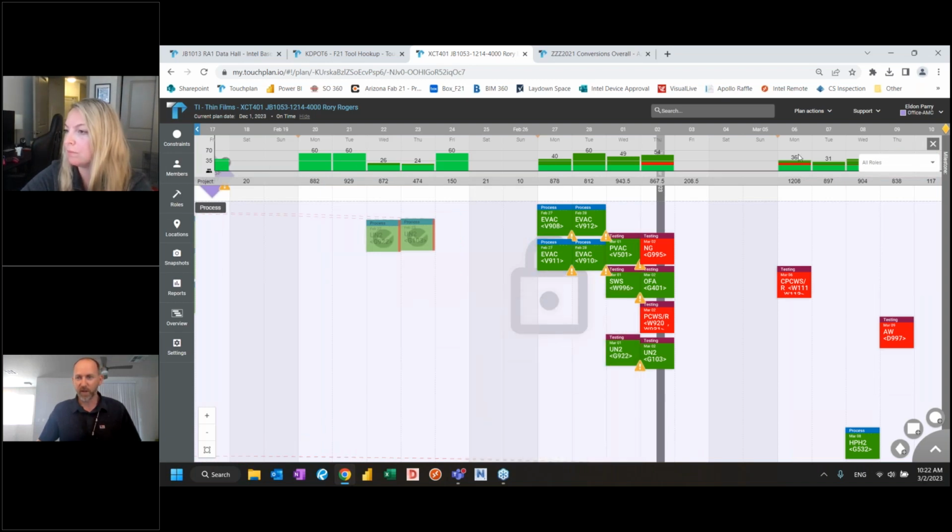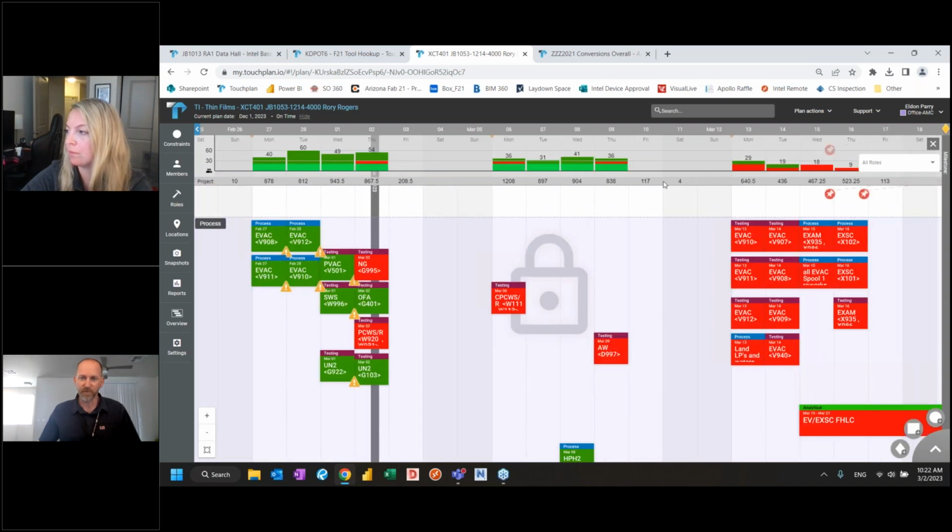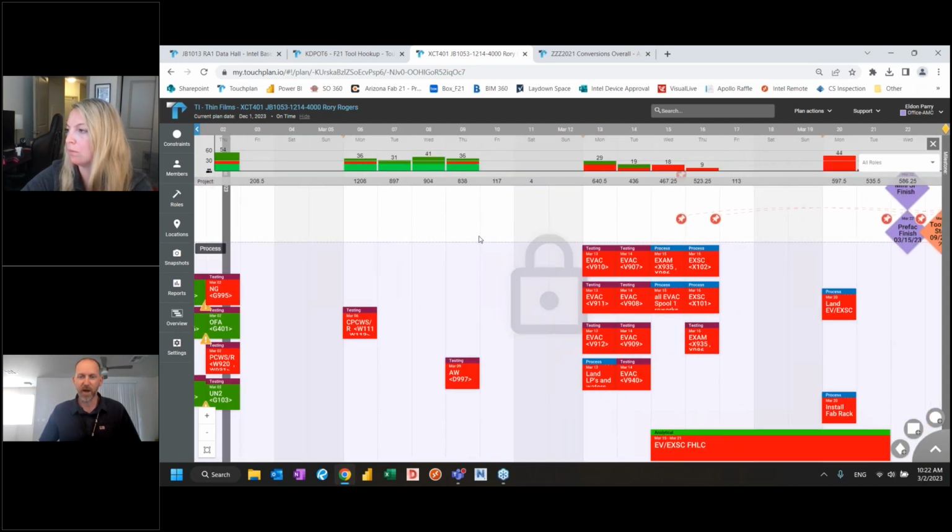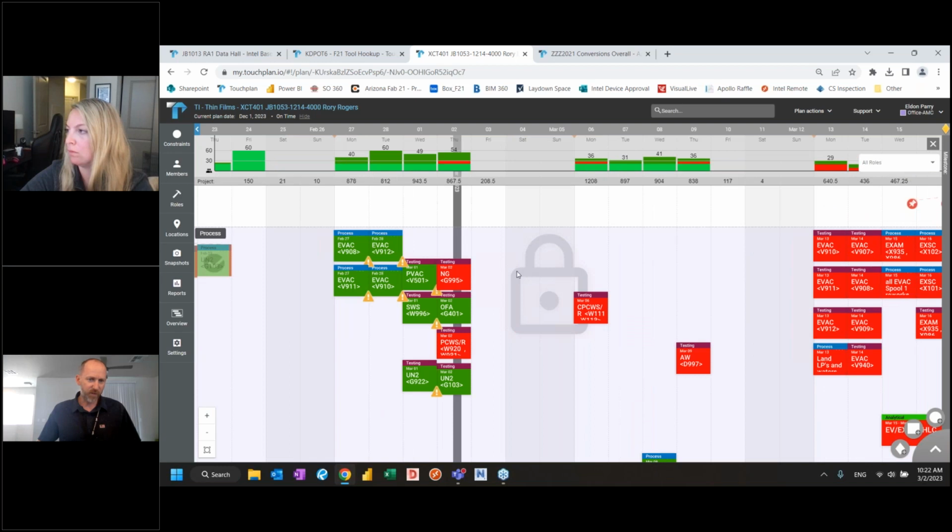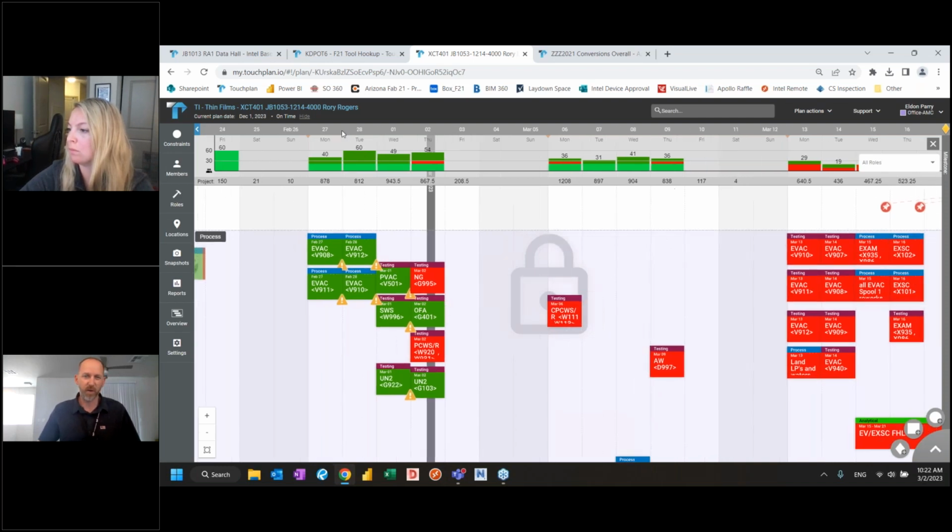And so we can then look at our crew plan size up top and figure out where things spike and come down from an hours perspective. We've found on some jobs and with some field teams, they think better in an hour perspective than in a 0.25 of a guy perspective. And that's an example of how we would use it, and again, we kick out Gantt.